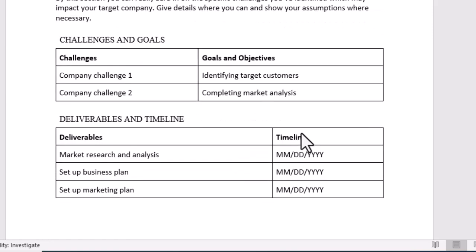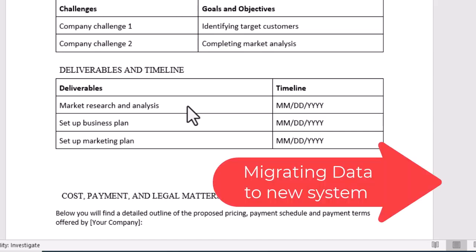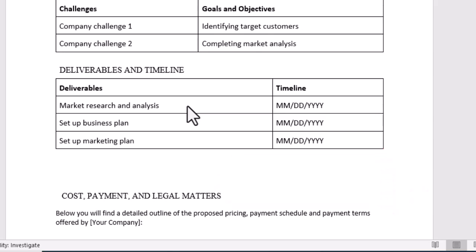Okay, so when it comes to scope of work, let's design how we are going to do this project, and then what's the timeline for this, and what's the budget we have for this, and then what are the challenges and goals. So the challenge is, whatever records we have manually, we have to migrate all the data into the database, right? So existingly that hospital may have some 10,000 members, already existing customers, everything is manually maintained somewhere in a notebook or somewhere. We have to make sure all that is migrated to a database.